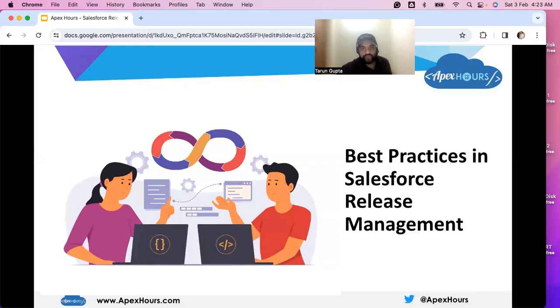Then the fourth step: align with the sprint cycle. Align with the cycle, which means we have a 2-week cycle. A sprint cycle consists of a 2-week period of development iteration. On the last day of the sprint, finalize the stories, prepare the deployment, and commit the story feature branch. Only stories committed to the sprint, represented by the feature branch, are considered for deployment post sprint.